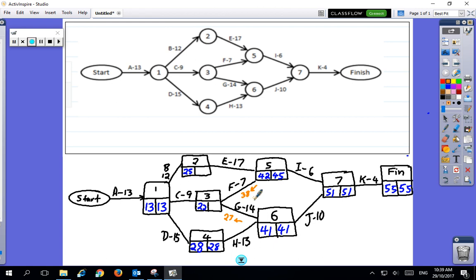So out of these two numbers, I have to take the lower one, because the lower one keeps this critical path on track and everything else flows along. So just as a note, when you're in that exam or you're trying to do these quickly, just look at the lower of the two numbers when you're backwards scanning, and that will be the one that defines what goes in there. And making notes on your little drawing will really help you to identify which numbers go where.